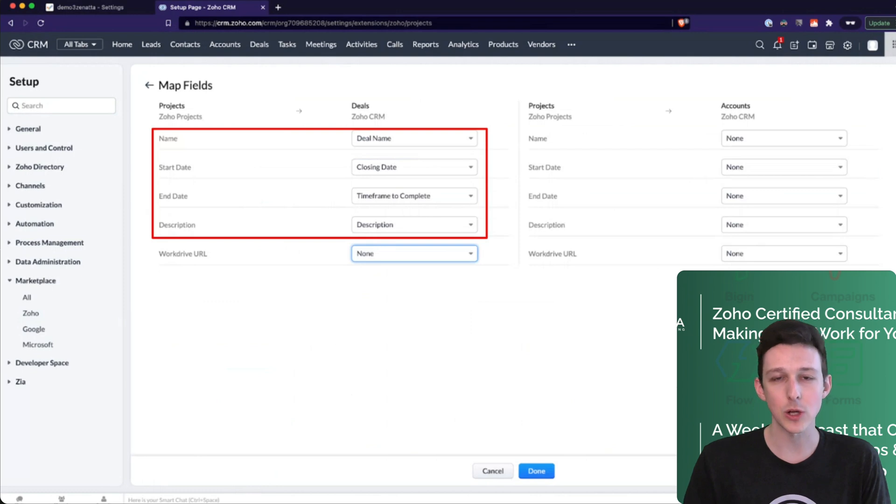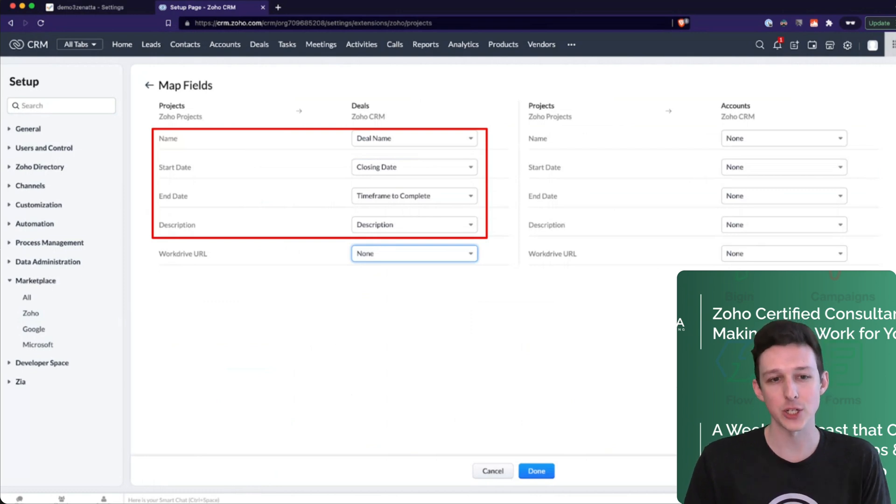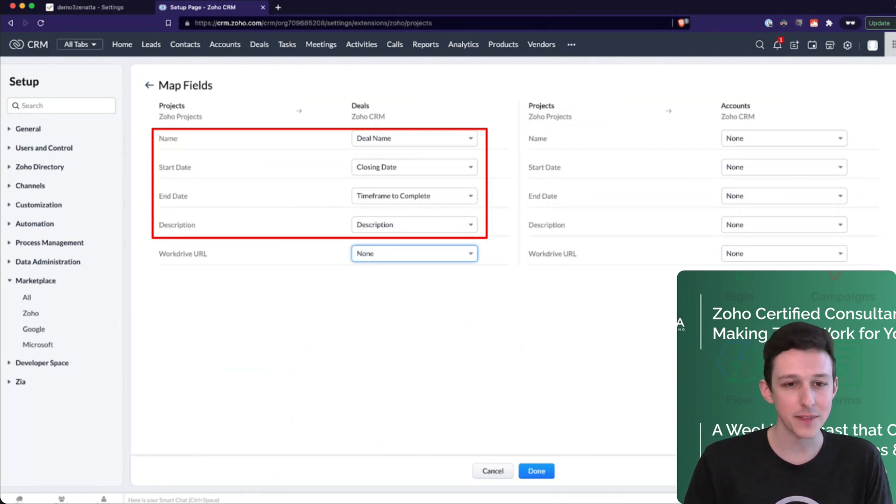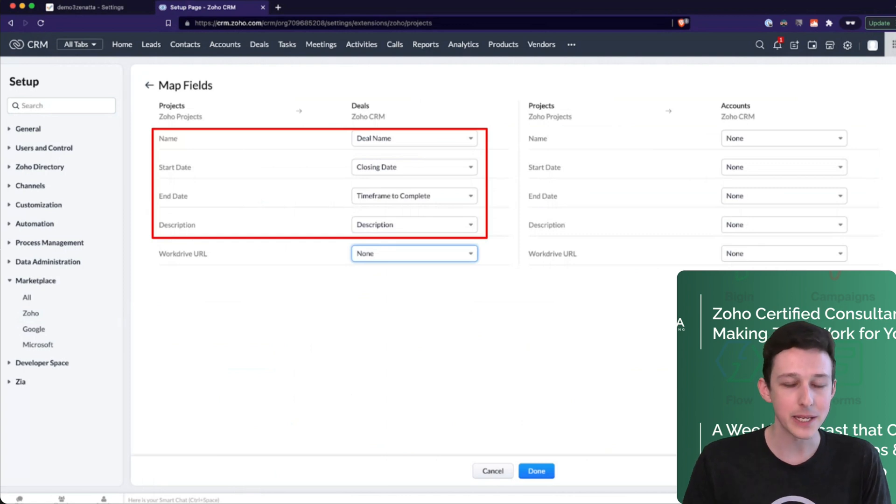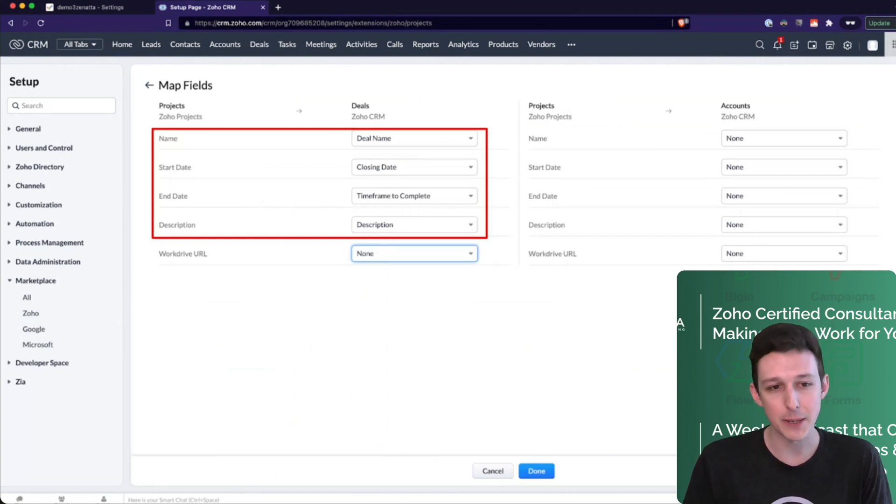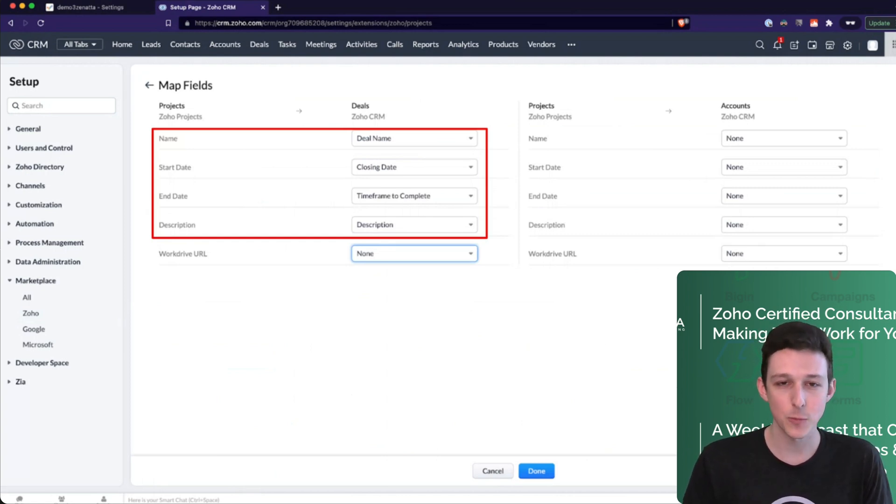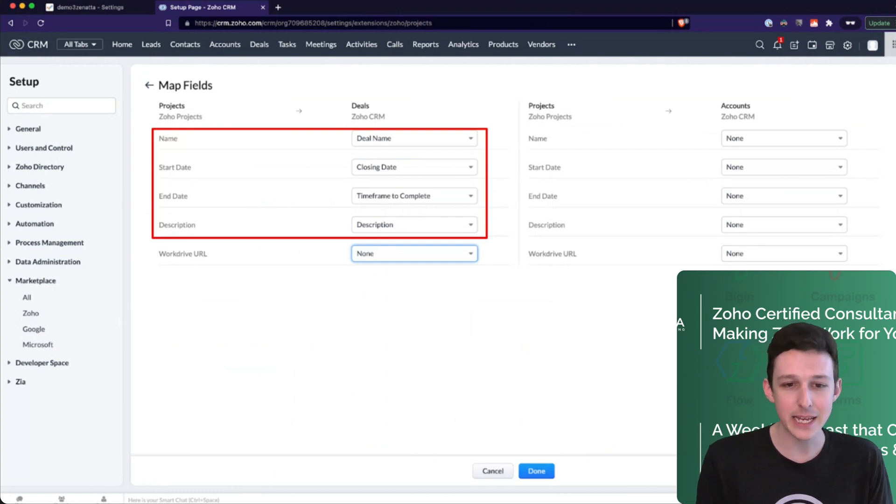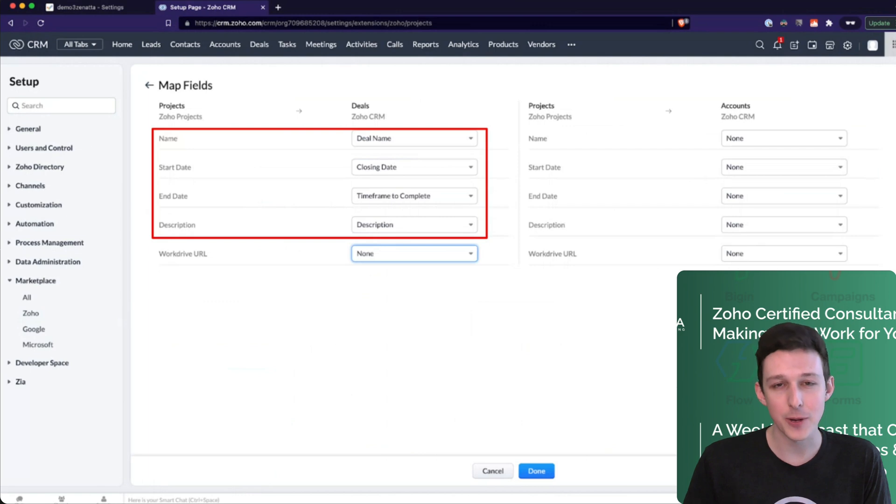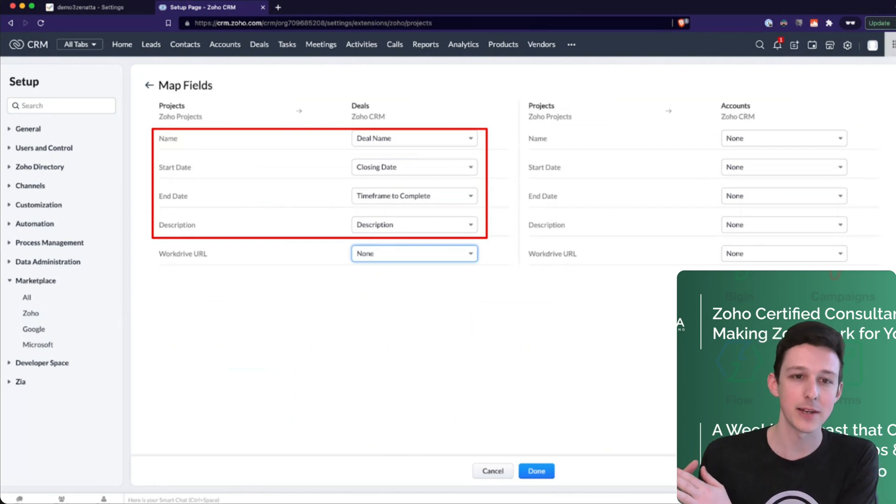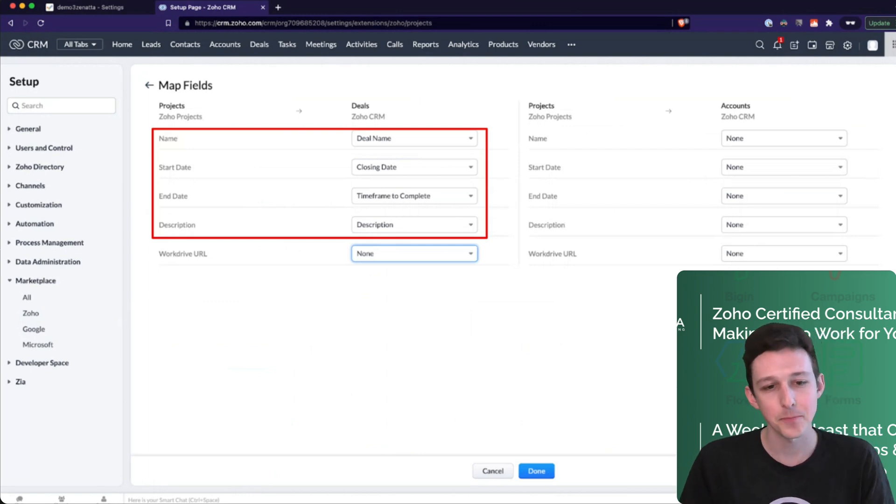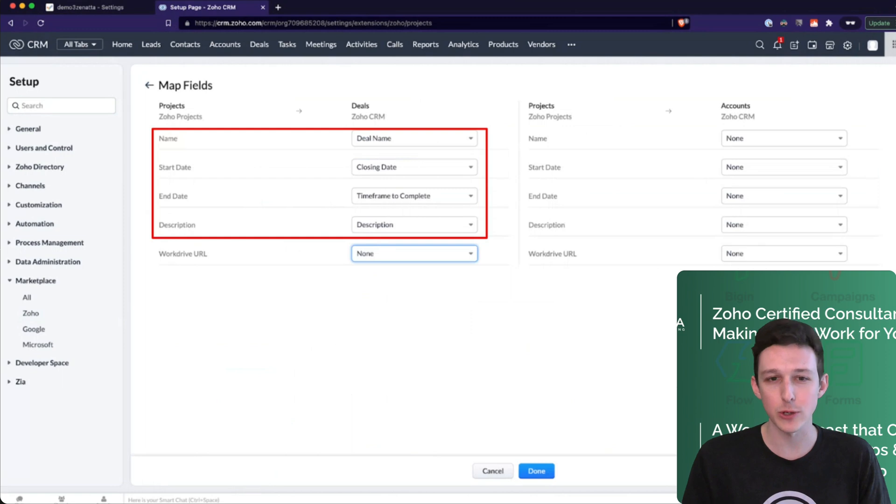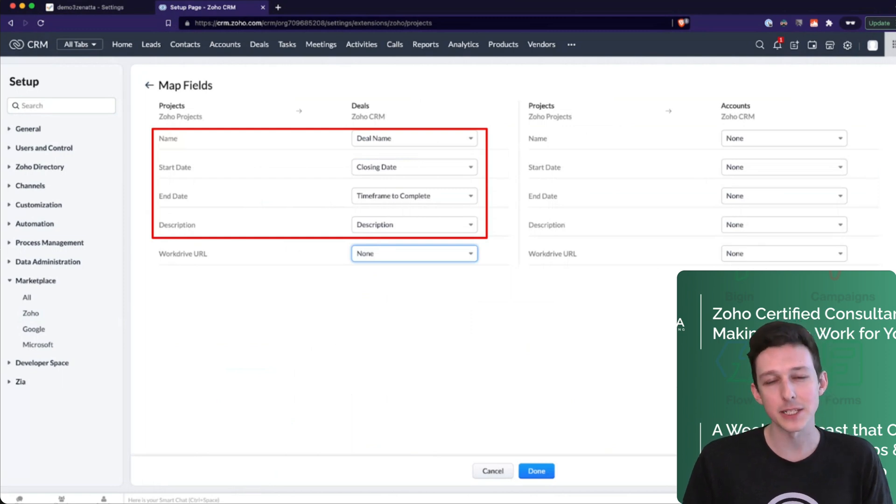And so this is in a case where this deal is to do this project. So once we close it, we want to generate a project from it. And so you can set things like what should the project name be? Maybe we want that to match the deal name. Maybe we're going to start this once the deal is closed and that's going to be day zero. Maybe the end date, maybe we have a custom field like time frame to complete, and that's going to do the tail end of the project. And then maybe I want to pull over the description from the deal as a top-down description on that project itself.